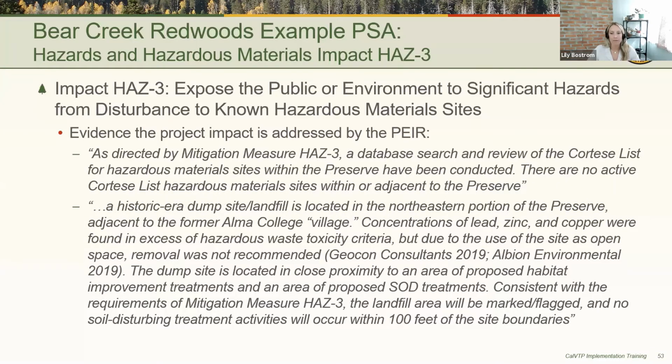So then you provide the evidence that your project impact is addressed by the program EIR. So for Bear Creek Redwoods, as directed by Mitigation Measure Haz 3, a database search and review of the Cortese list for hazardous materials sites was conducted, and there were no active Cortese list hazardous materials sites located within or adjacent to the preserve.